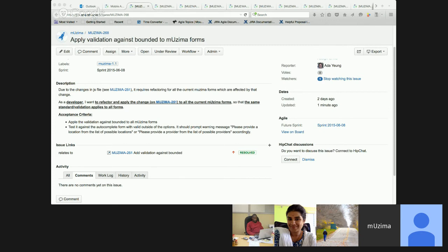So right. I mean, I would say if the effort to update one form is probably like a 1 point or something. So if you multiply it by the number of forms that we have, I would say this ticket is gonna be like, I don't know, 8 or something. Sure, makes sense. Yeah. Agreed. Simple task doesn't mean that it's quick. You know, it still requires time and effort. So.